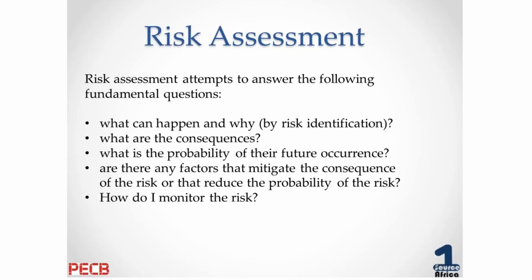Now, risk assessment attempts to answer the following fundamental questions. What can happen and why? And that's part of the risk identification process. What are the consequences, also known as the impact of the risk? What is the probability of the risk occurring in the future, or the likelihood of this risk? And are there any factors that might mitigate the consequence of the risk or that reduce the probability of the risk? So that's having a look at your current control environment and seeing if there's anything that currently manages the risk. Lastly, a question is then asked as well: how do I monitor this risk?